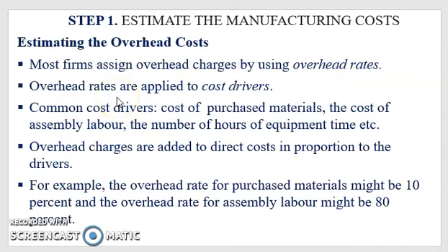Next step is to estimate overhead cost. Most firms assign overhead charge by using overhead rates. They are also called as the burden rates. Overhead rates are typically applied to one or two cost drivers. Cost drivers are the parameters of the product that are directly measurable. Overhead charges are added to direct cost in proportion to the driver.